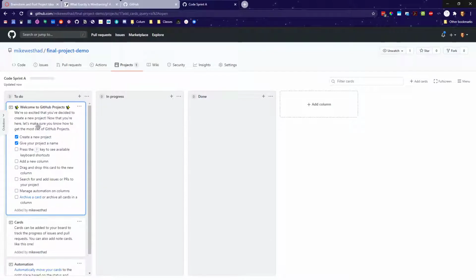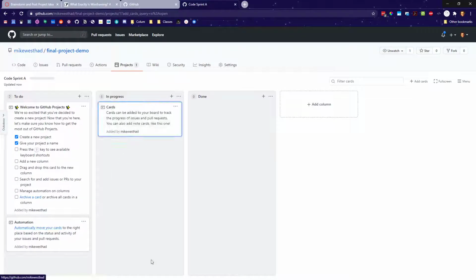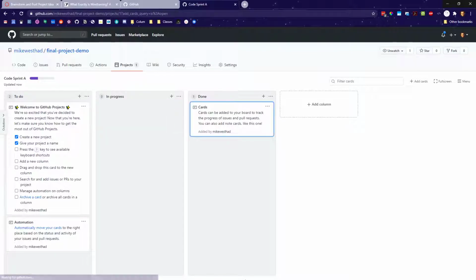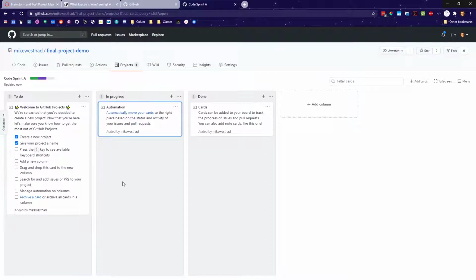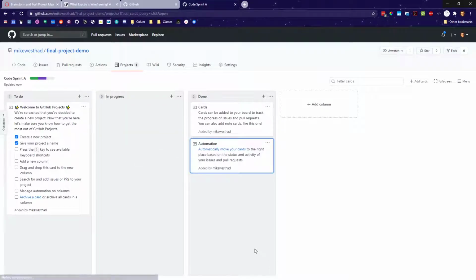The idea with Kanban is that you keep a backlog of all your tasks, and when you have capacity to work on them, you pull them over to your in-progress. You try to limit how many things you're working on at one time, and when you finish one, you move it over to your done track. So I would keep working through the week and add cards as I have time to my in progress and then mark them as done when they're done.